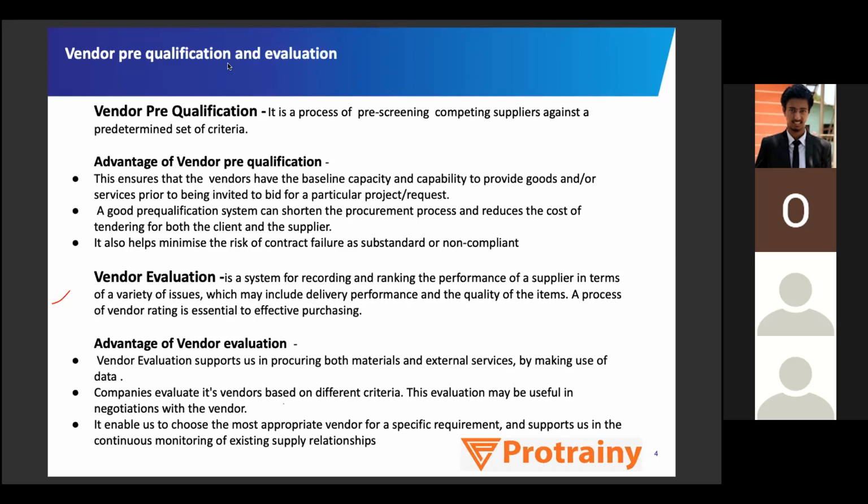So vendor evaluation is a system for recording and ranking the performance of suppliers in various terms. We can say it will include whether the vendor is delivering the material in how much time, whether the vendor is providing quality material or not, and whether the vendor is providing the material on time. So all the 5 R's will come into place and we will evaluate the vendors. It may happen that if the market is going on, suddenly the price increases and the vendor says no sir, I will not be able to supply the material.